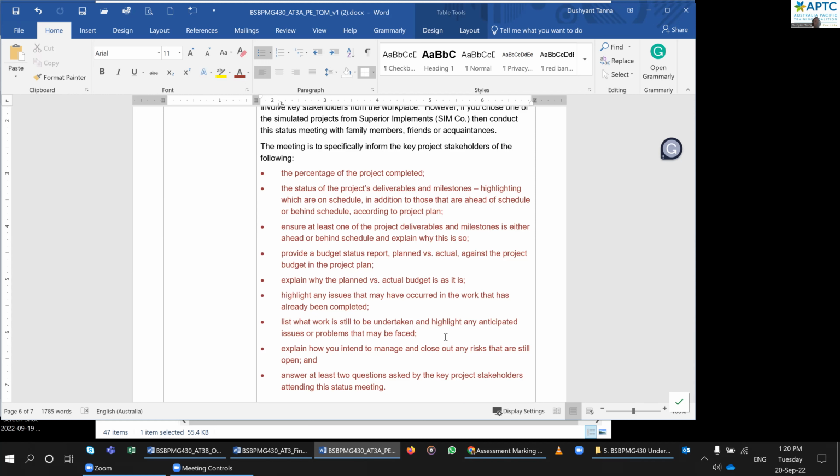Yeah. If you have, like, plan was 40,000, actually is 43,500, you are explaining why you need to spend 3,500 more than you planned. You can say, oh, we planned for a contractor, but he was super busy and he didn't keep his promise. So I had to look for another supplier, and that supplier is new to us. He said, I'll give you a discount on the next order, not on this one. And that's why I had to increase my cost. But I had some buffer, so I'm not asking for more money, but I'm having something shorter in my planning. Yeah, so you're justifying your number, right?